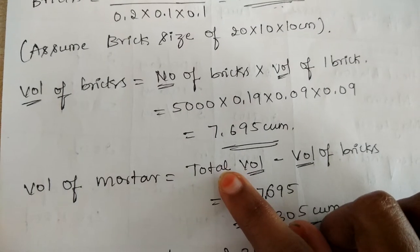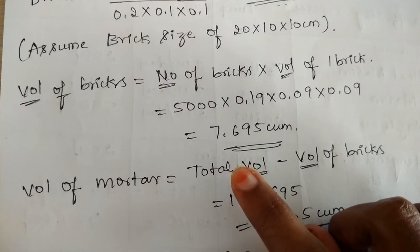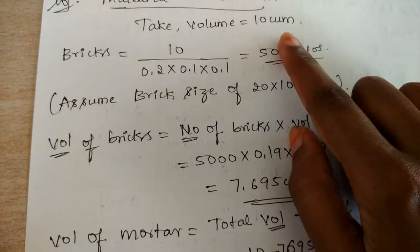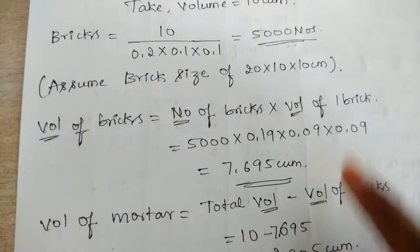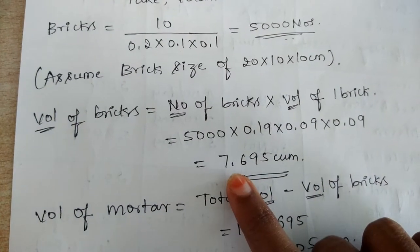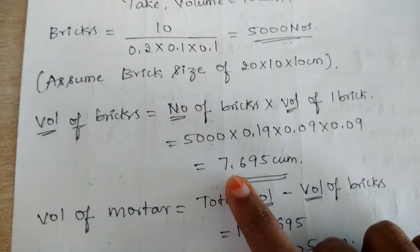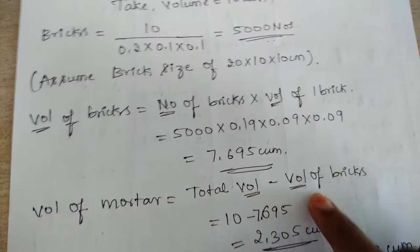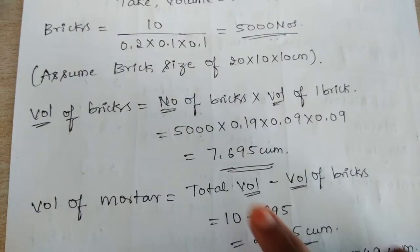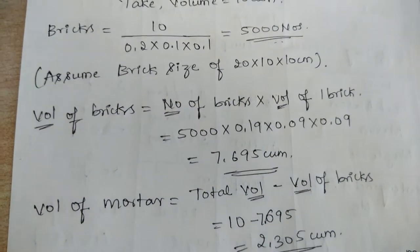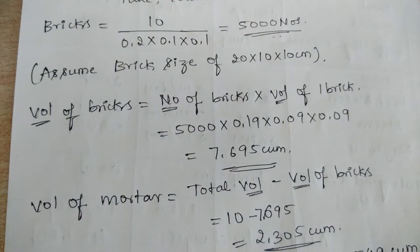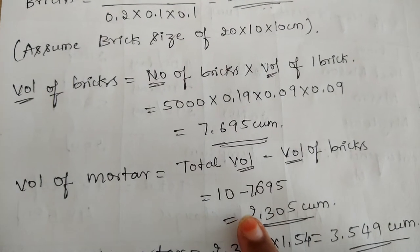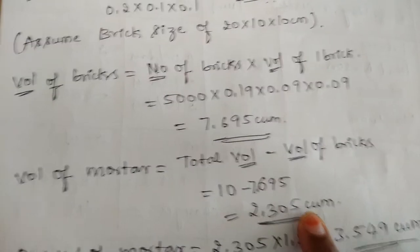To find the volume of mortar, we subtract the total volume we considered earlier from the volume of the total number of bricks. So the total volume is 10 cubic meter minus volume of bricks, that is 7.695. On subtracting these two values we get 2.305 cubic meter.